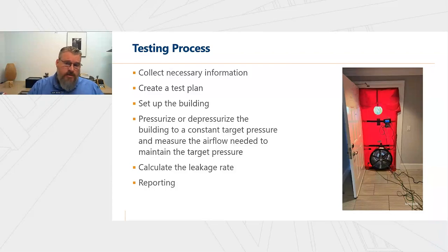And of course, the amount of equipment determines shipping costs, labor to set up and operate it. That's really going to drive the cost of the testing. So we want to know that ahead of time. And also, there's a lot of other logistics related to power and where these things are going to go in the doors. And we'll talk a little bit more about that in a minute.